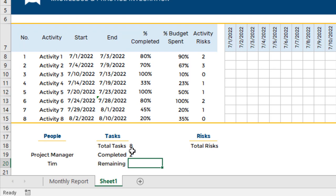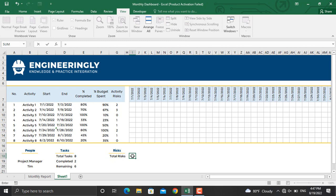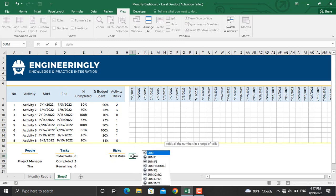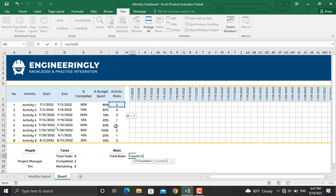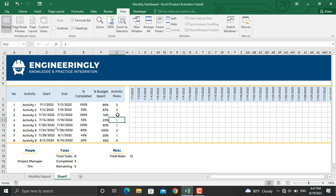The number of remaining tasks will be total tasks minus completed tasks, so I'll write equal sign, this value minus this value. For the total risks, I'll write equal sign, SUM of the risks in these cells, close the parenthesis, and press Enter. Now this part is done. If I make any activity 100%, it will be automatically added to completed and deducted from remaining. If I add two risks, the total number of risks will be updated as well.